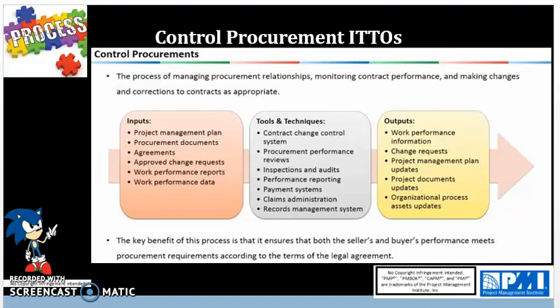And you're asking potential vendors or bidders to the bidders conference that happens in Perform Procurement process, and you're going to get what they offer, the price. So the request for quotation also comes into place, asking potential vendors of what price or value they are putting on their service per hour or per item or other unit of measure. Then you have RFP or request for proposal or tender, RFT, where the potential vendors or bidders, you're going to be asking them what they actually are proposing to offer as a service to the buyer. And those are all the types of procurement documents.